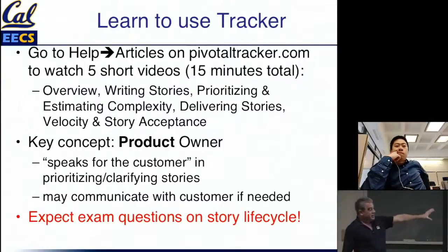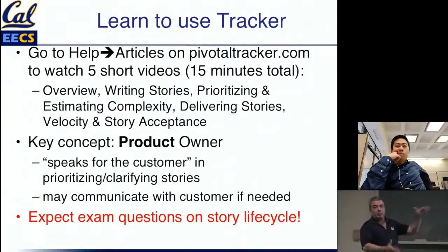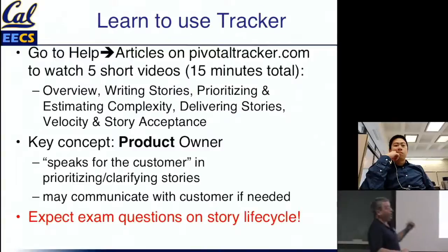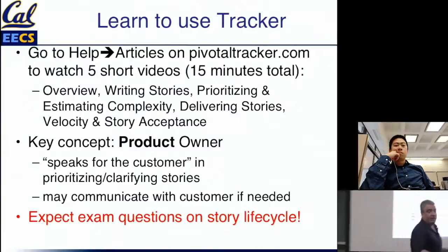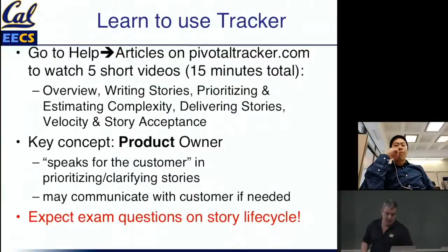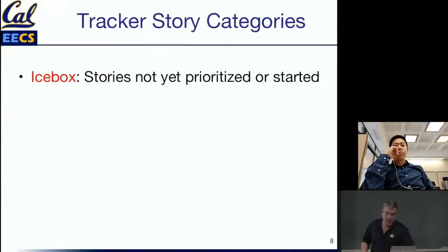Like I said, this aspect of dealing with stories in the planning phase is actually really important. So you absolutely should expect questions on the exam and stuff like that about the story lifecycle. So now that you're paying attention, let's talk about the story lifecycle and what those categories mean. So like we said, the icebox, stories that you know you have to do, but they have not yet been prioritized, they haven't been started, they haven't been assigned to anybody.